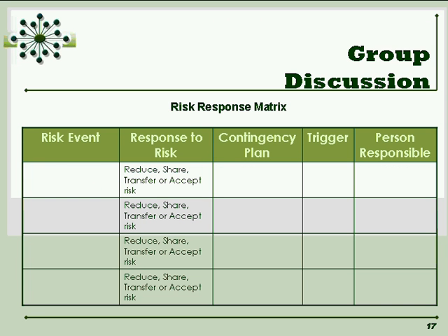I think a good time point to look at this sort of thing is after a protocol is approved and finalized, and as the protocol-wide manual of operations is put together, and prior to, like you said, local SOPs being written. So I think that's a good time point.